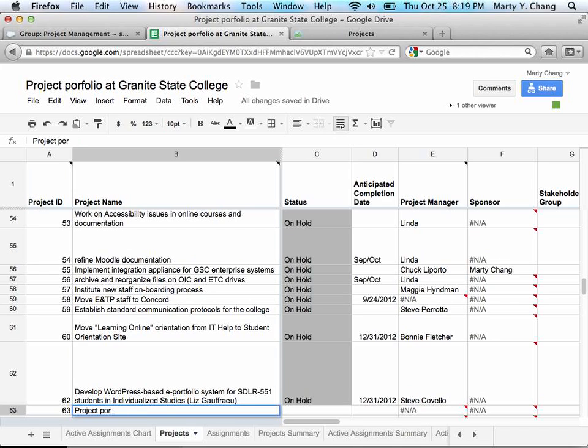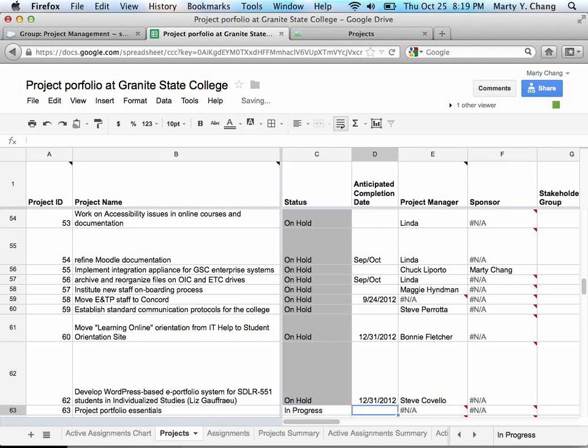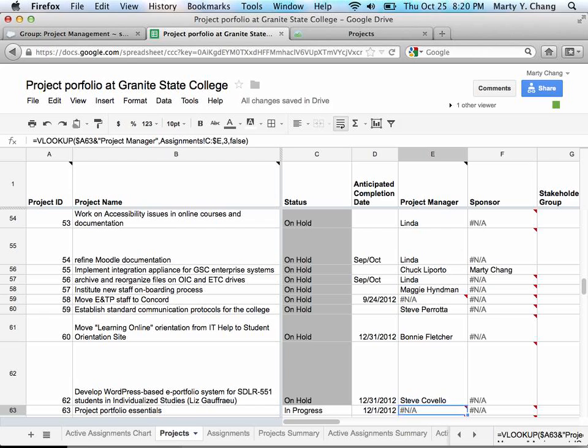For example, I'm going to add in the project for Project Portfolio Essentials. And when I'm done, I'm going to add the progress, which is the status, anticipated completion date. And I'm pretty much done with this page for now.